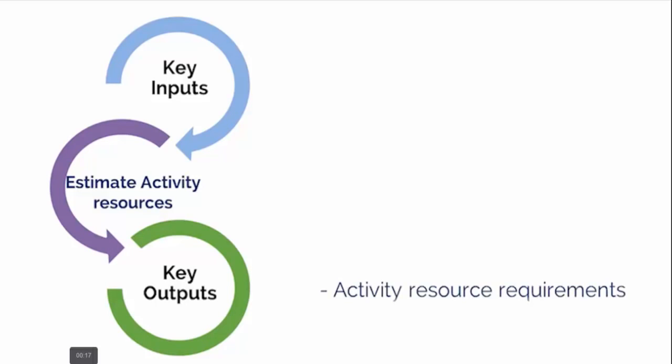These requirements can then be aggregated to determine the estimated resources for each work package and ultimately for the entire project level. The amount of detail and the level of specificity of the resource requirement descriptions can vary by application area. The resource requirements documentation for each activity can include the basis of estimates for each resource, as well as the assumptions that were made in determining which types of resources are applied, their availability, and what quantities are used.